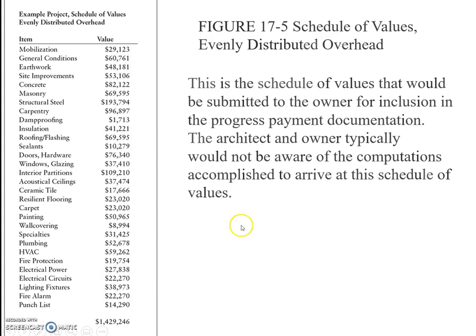The next thing we can observe from the schedule of values and estimates is the separation of lump sum items. For example, some items, particularly subcontractor bids, combine several items into a lump sum in the estimate. The schedule of values may require further breakdown of these items.